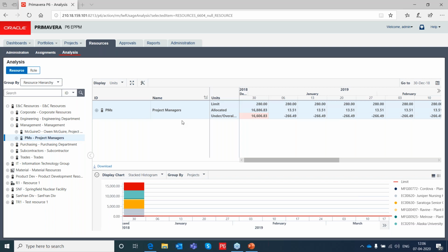I have an answer, yes and no for that. Yes, you can do it in a different way by using the earned value analysis, right? No, you can't track it based on the quantity. That is a challenge with Primavera till now, because you can't track resource utilization or how the status is getting updated in a project based on a quantity.